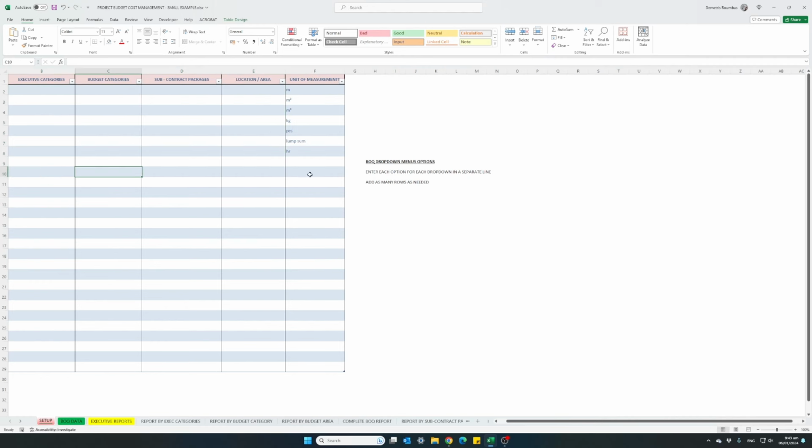We've ordered 120 square meters, and we managed the price of €22 per square meter. The final cost projection is picked up for this line from the agreement section, and the other two lines are picked up from the original budget, since we still haven't made a purchase, an order for these tiles.